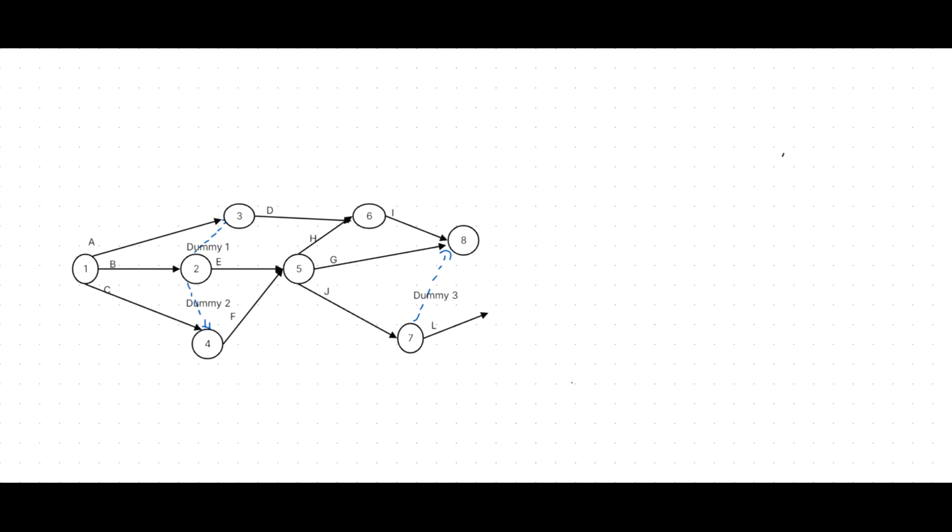For the M, complete K and L. For the M, we need to complete K. I'm going to start K. We're going to start K after completing G, I, J. Once G, I, J are complete, then we can start K from that event. Now,